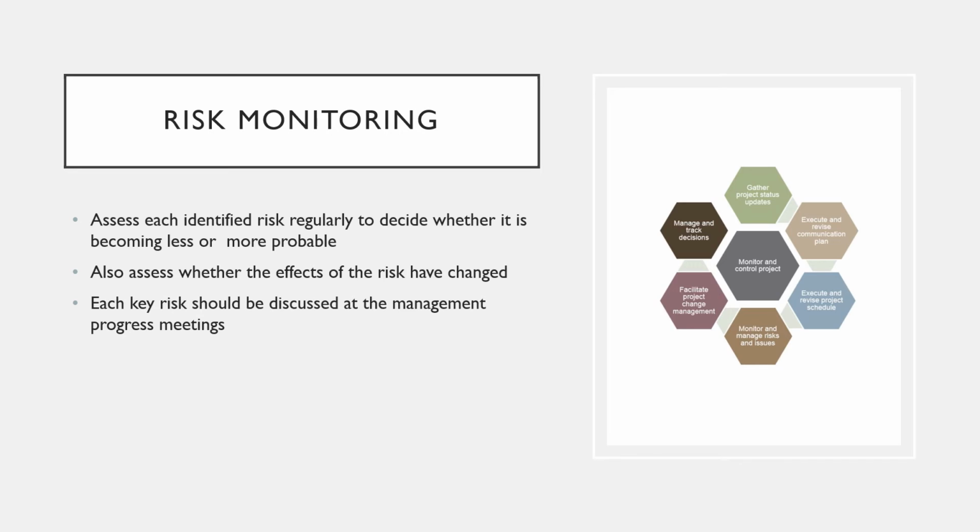These factors are obviously dependent on the types of risk. You should monitor risks regularly at all stages in the project. At every management review, you should consider and discuss each of the key risks separately. You should decide if the risk is more or less likely to arise and if the seriousness and consequences of the risk have changed.